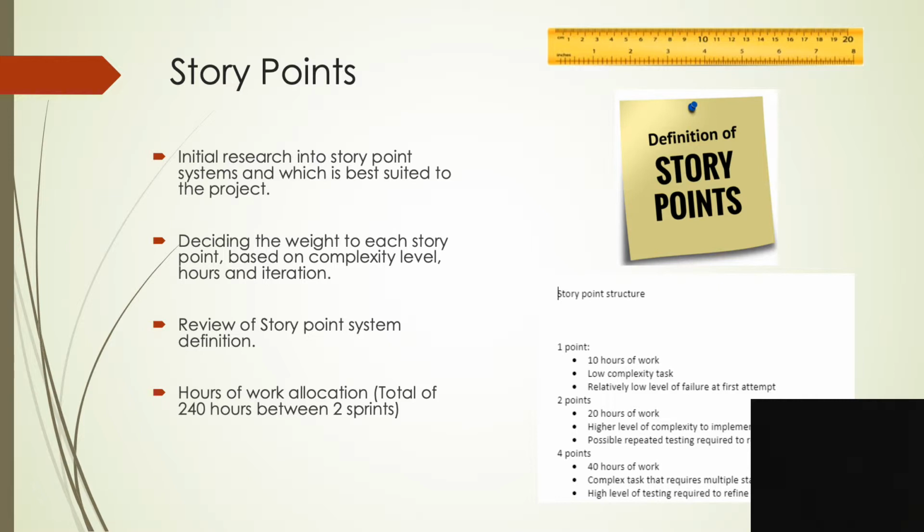1 point would represent 10 hours of work, low complexity, low level of failure. 2 points would represent 20 hours of work, medium complexity, and possible repeated testing. And finally, 4 points or more would require 40 hours of work, high complexity, multiple stages of implementation, and a high level of testing.